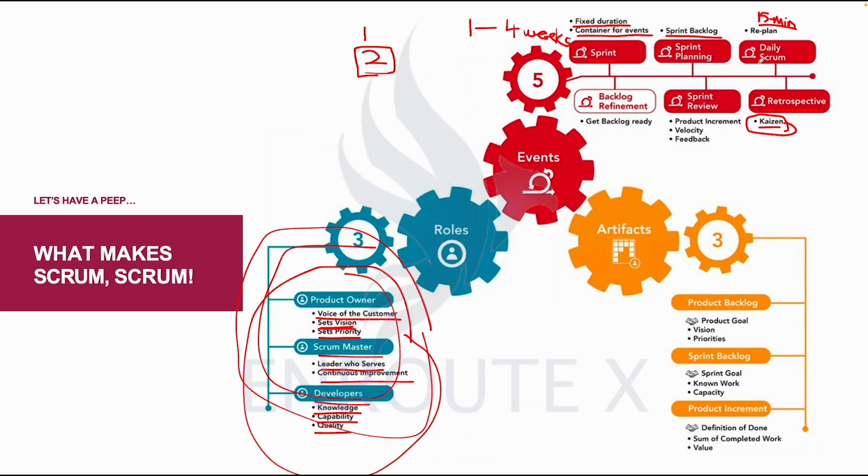What are we delivering today? What are we executing today? Then 3, are there any blockers or any challenges that need to be resolved? Those 3 essential questions need not be generic, but all the conversations at the daily Scrum revolve around those 3 questions.